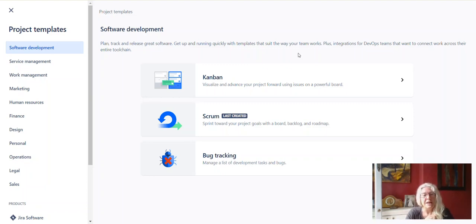If you create a Scrum board, you get a lot of reporting functionality that you can have in your backlog. You'll have a proper backlog, which you can create sprints within that backlog, so you can use those as buckets for different things. Some teams, I have used a separate backlog bucket for refined tickets, another bucket for the highest priority next to be refined tickets, and then you might set up stories for the next couple of sprints in different buckets. You might end up with 4 or 5 buckets in that backlog. That's something that you can only get in the Scrum project.